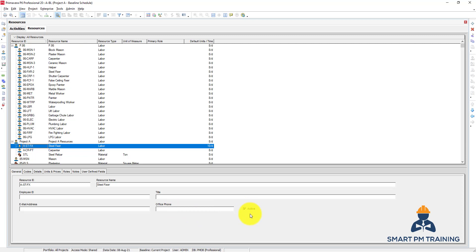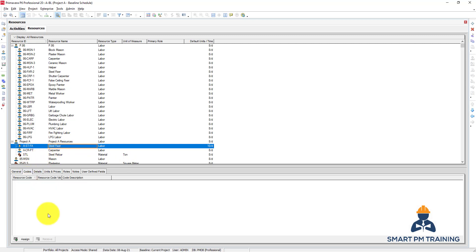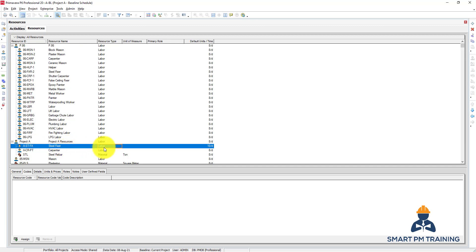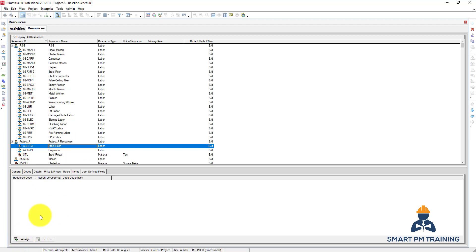For the Codes, you can assign codes for the resource. Maybe the steel fixer - you have two groups in the project, group A and group B, for example two different areas in the project. Another code might be useful to make a category: if the labor works for you as a contractor or it works for a subcontractor. So you can have this role - is it subcontractor's staff or the company's staff? To add, you have to first, before you assign the resource code, you have to create a new one.